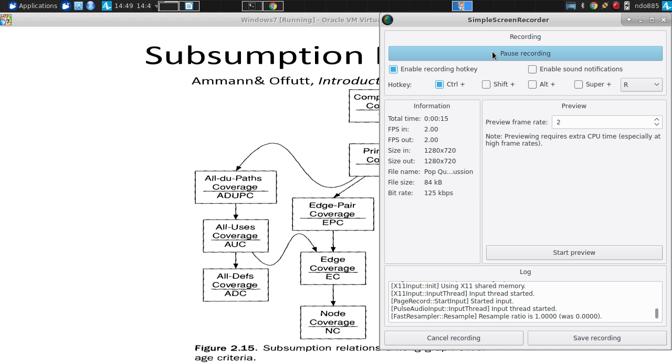Function of risk scanning. What's the job of risk scanning? Yeah, Bill. The plan can look at risks that might be coming up, looking at the project, but also talking to the people associated with the project, and assessing the risks that were present in the past, and how relevant they still are to the project. Yeah, so good. Yesterday's risk is often today's problem. Risks have a way of being possibilities and then materializing, coming about. And so part of the job is to try to catch that as early as possible.